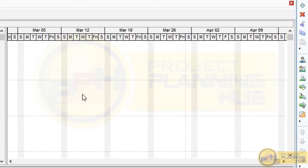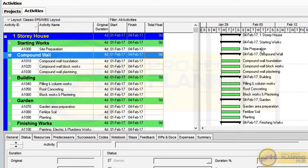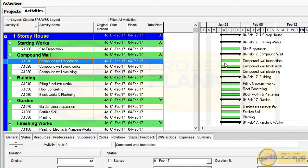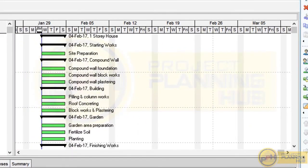In the Gantt chart I cannot see any activity bars. If you can't see any bars, just double-click here and it will make the activity bars appear. This area is called the Gantt chart area. Each bar represents an activity in the list. The length of each bar comes from the activity duration — bar length will increase and decrease based on the duration.